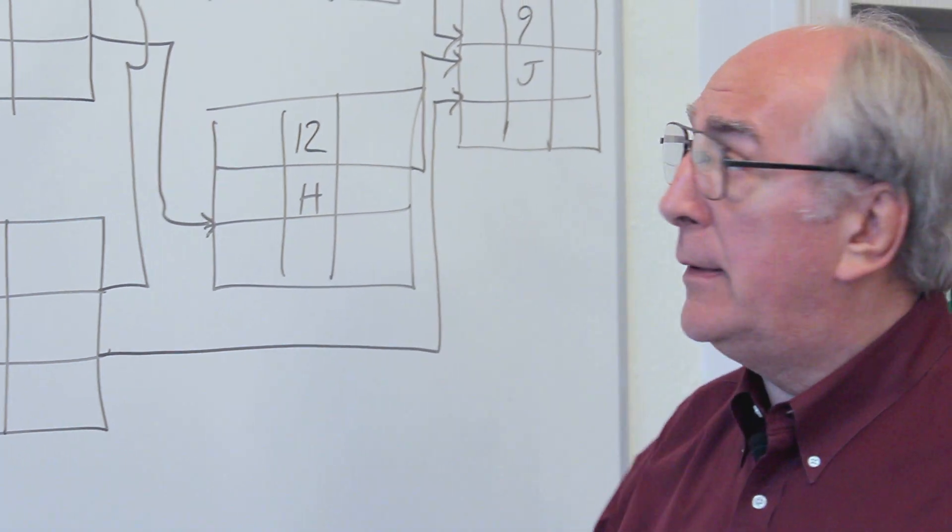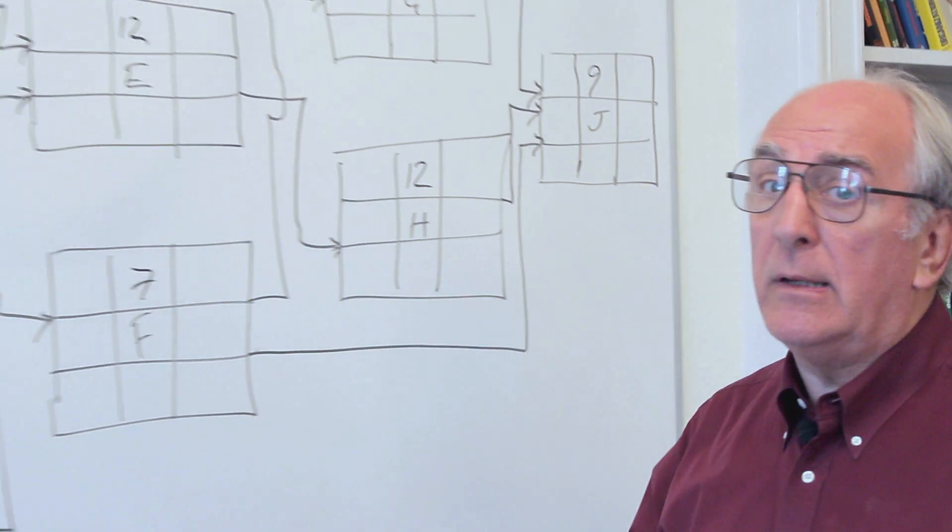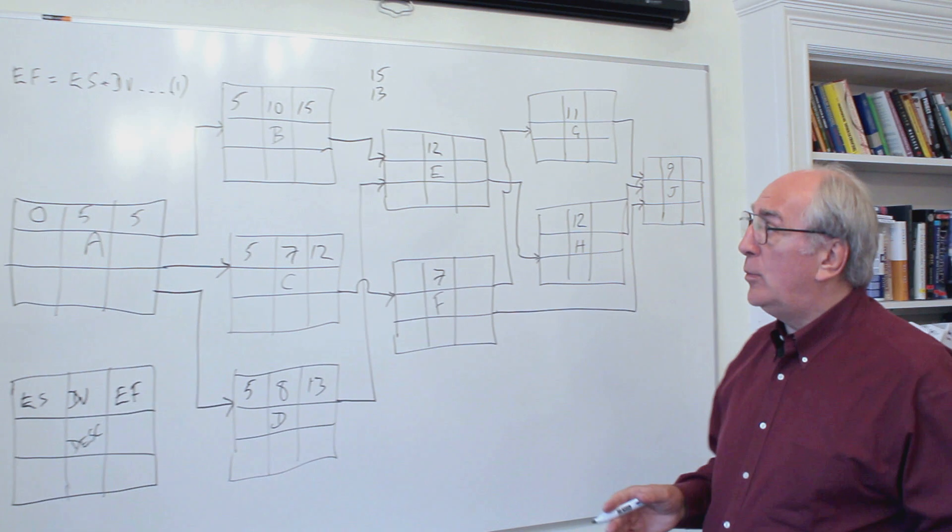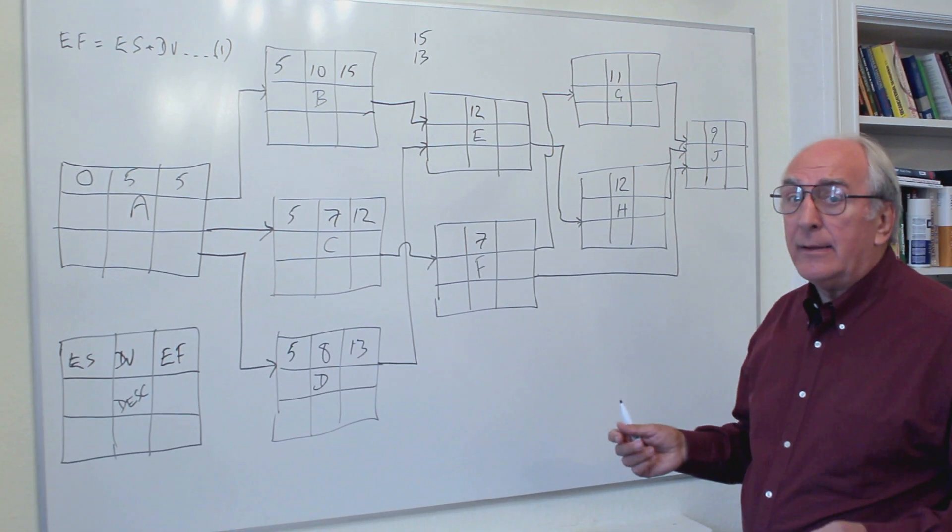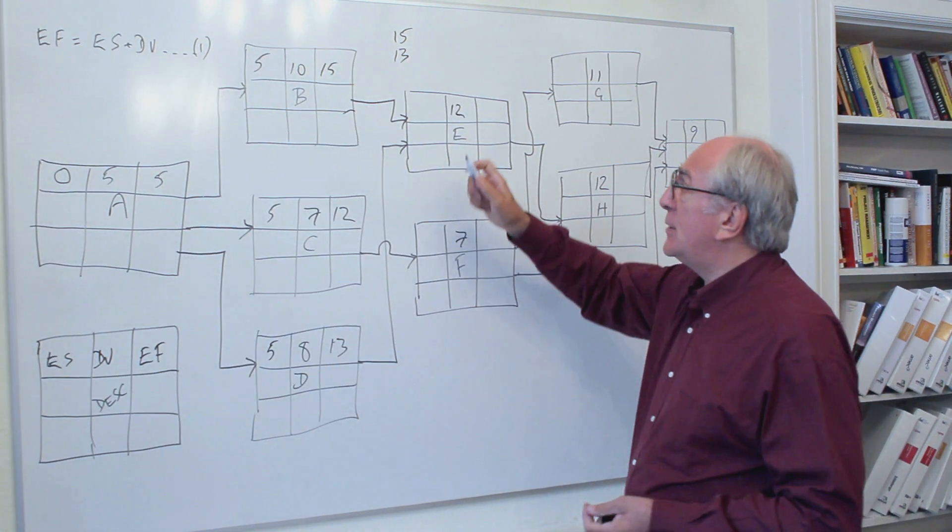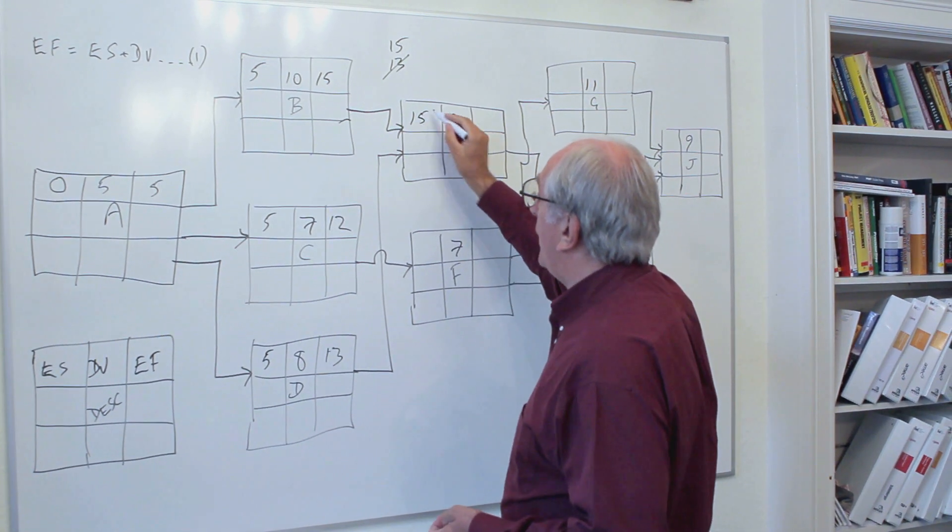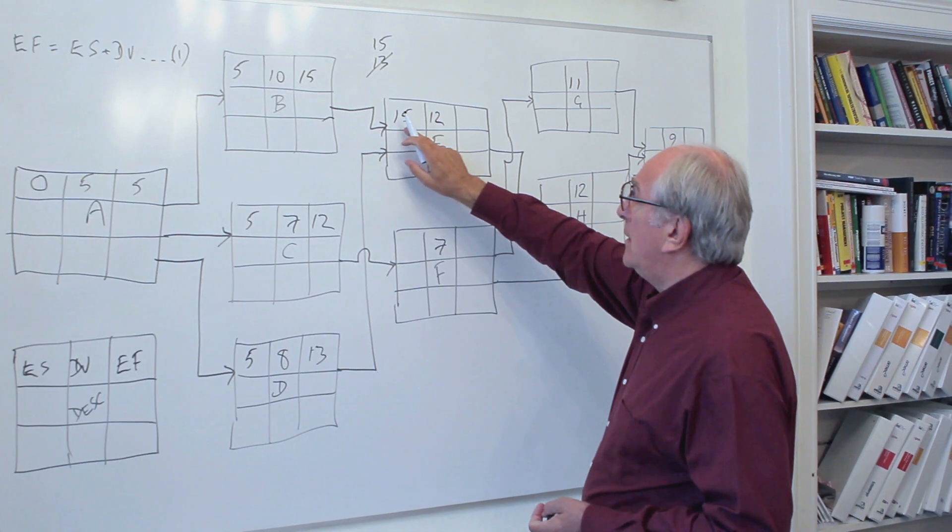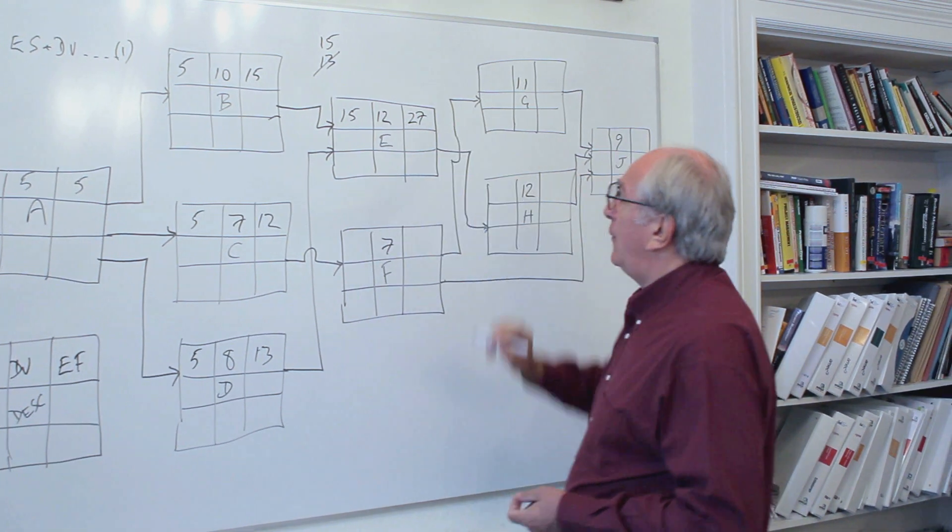Since we've said that we have to have B and D done before we can start E, then quite clearly we can't start E while B is still operating. So we have to have finished D and B in order to get job E started. We must take the maximum of that choice there. So we'll put that 15 in here. 15 plus the duration 12 for E gives us 27 for the early finish of E.